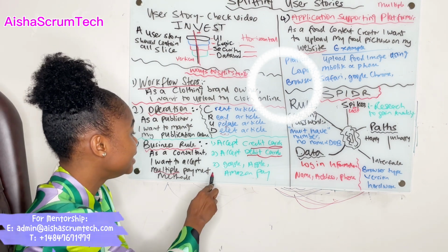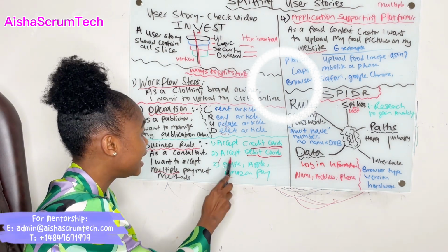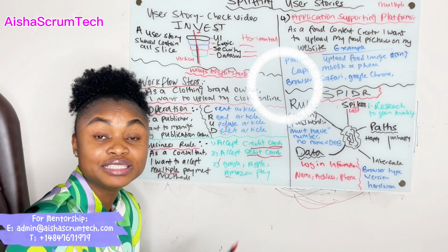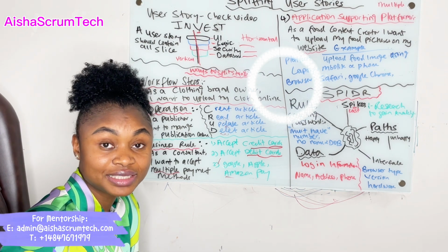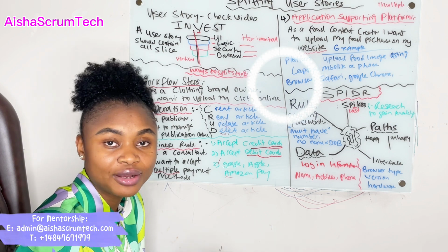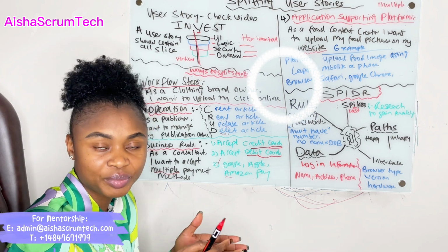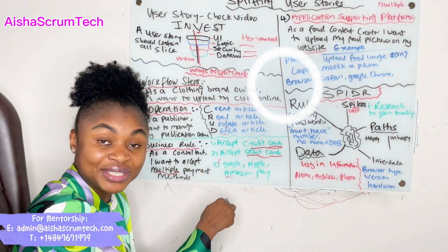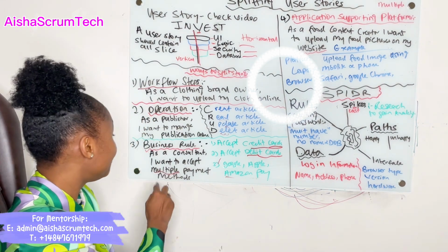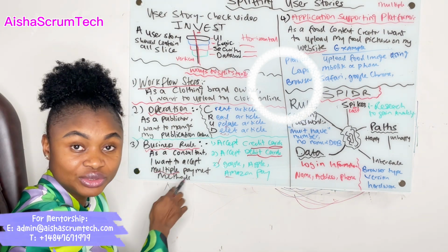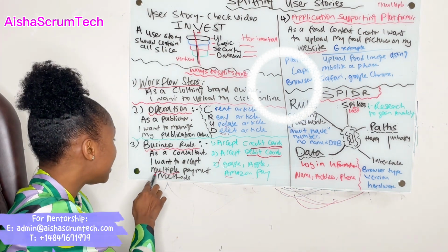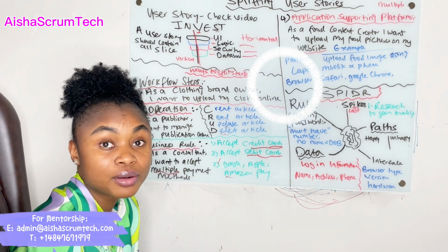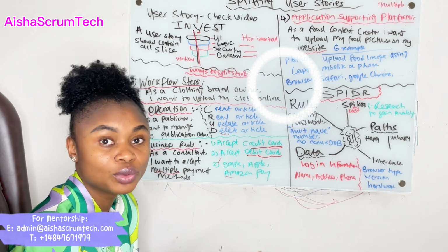And the last one is different methods to pay online. For the next sprint, you can focus on accepting different online payment systems like Apple Pay, Google Pay, Amazon Pay, or different kinds of pay that we have. PayPal is one of them. And in that next sprint, we'll focus on that, instead of having one big user story in the sprint for multiple payment systems, because there's a high chance we might not complete all of that in a 2-week period.